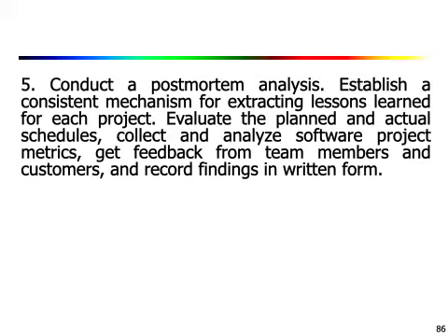Then finally, the fifth part is to conduct a post-mortem analysis. That is, establish a consistent mechanism for extracting lessons learned for each project. Evaluate the planned and actual schedules, collect and analyze software project metrics, get feedback from team members and customers, and record findings in written form. Okay, so this way you can conduct a post-mortem analysis of the project.